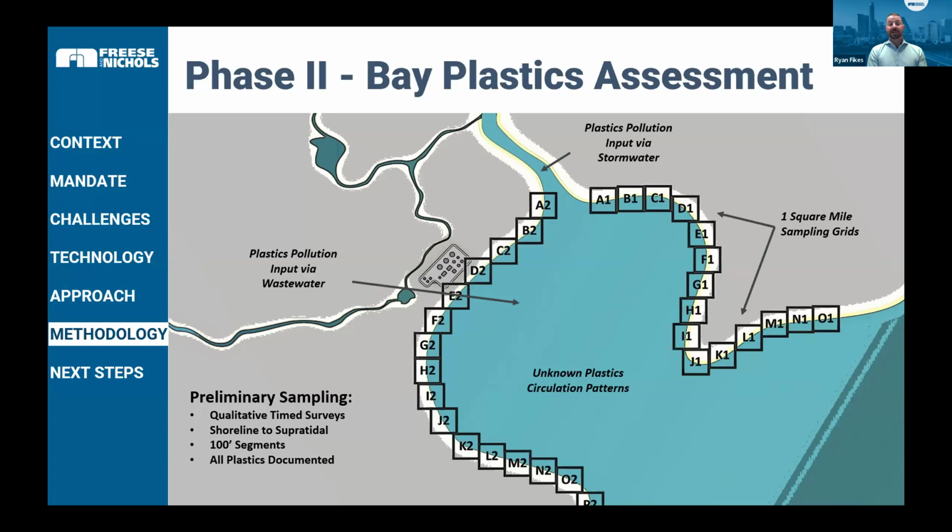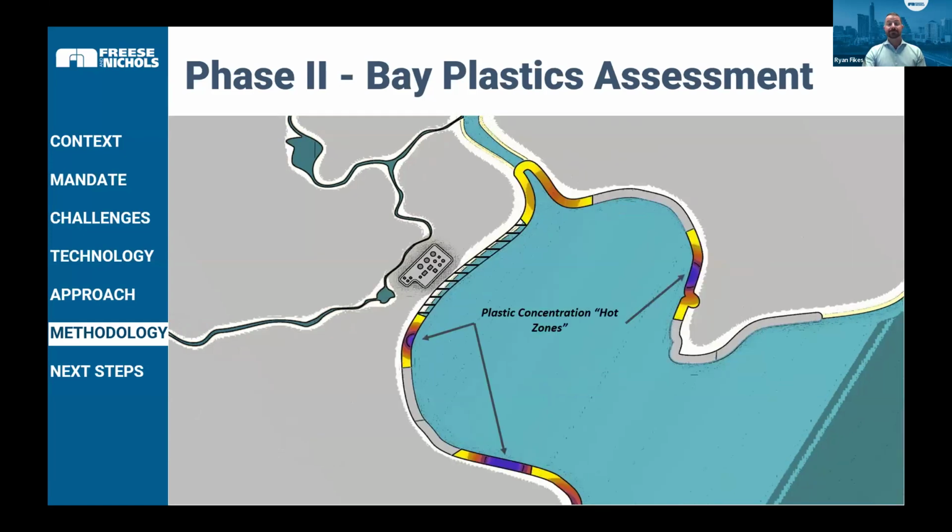In the creek, we have plastics-impacted soil and those surface plastics. That's mainly because of the ag land and the cattle pushing things into the soil, and also things such as wild hog. On our bay shoreline, where we have more consolidated sediments, wetlands, beaches and shell hash, we do not have that same impaction issue. It's a surface plastic issue. So we're not going to be doing any digging, but of course the scale and the mobility component is a lot more complex when you get into the bay system.